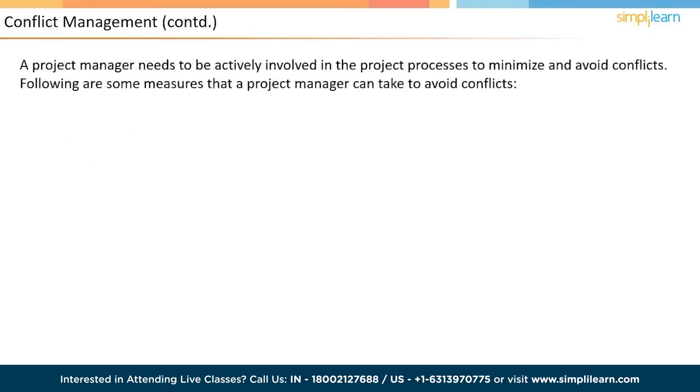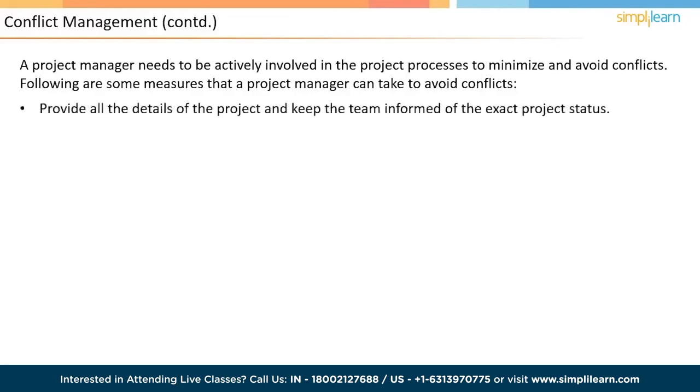As a project manager, if you find yourself in a conflict with a team member, sit across the table and resolve it. If not, they should get their immediate managers involved and try to resolve it. To avoid conflicts, a project manager should let everyone involved have complete clarity about the project. Assign the roles and responsibilities to each of the team members clearly. Ensure that there are no overlapping responsibilities, which could be a possible cause for conflict.